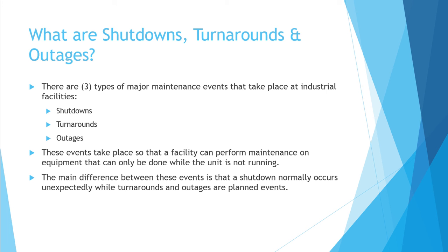Turnarounds and outages, on the other hand, are usually meticulously planned events that facilities spend years preparing for. I previously worked for a manufacturing company, and there was times when I would see their schedules and they were planning for a turnaround that was 5 years down the road. Now, this is pretty normal for these types of facilities just because of the long lead times for new replacement valves and just all the planning that goes into these events.